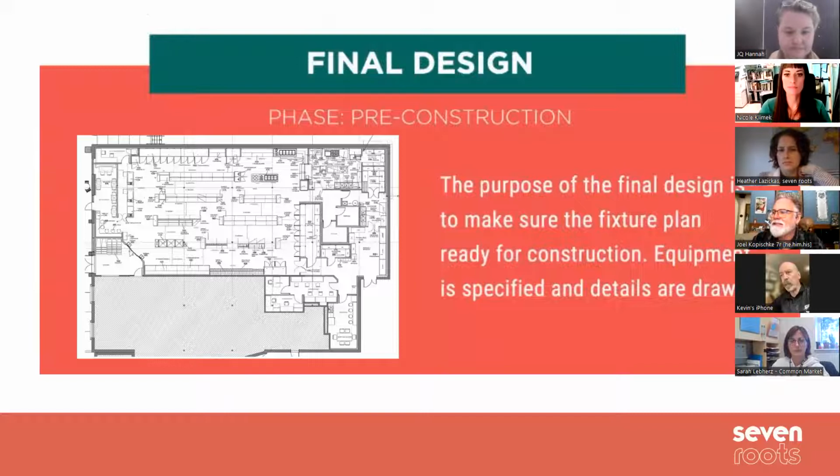The fixture plan will include all the details for all the other disciplines and trades associated with the design and the building process. It locks in the exact locations of electrical and plumbing components like floor drains and all the stuff that is really, really super expensive to move once you start doing this.